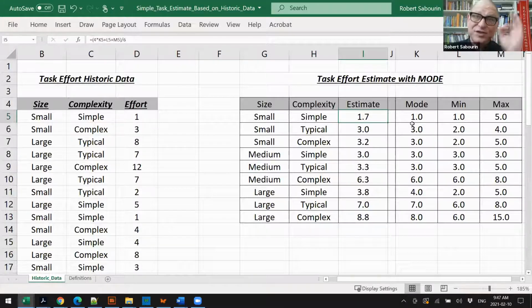It's numbers of sessions, it's a whole number. What's the most common whole number? So it's the mode, it's not the average. If you're not familiar with the difference between mode and average, you should learn that before you get into estimation. It makes a big difference. And this is it. That's the basic SEBTE approach.